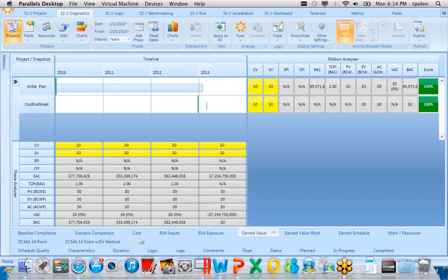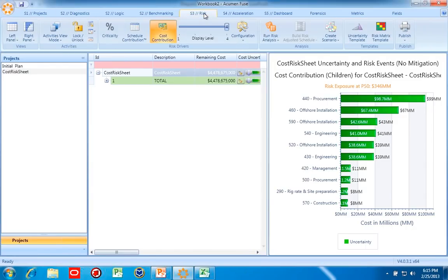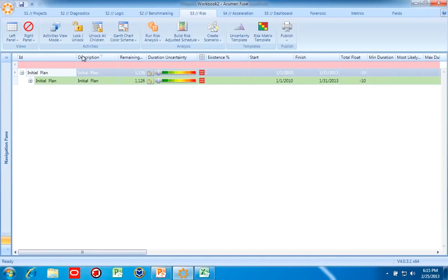Let me find a few more here. Do the P50 dates import seamlessly back into P6? Yes, and this is a capability that I'll mention as well. This is a question from Vincent. As I'm creating those different scenarios and adding P80 values in Acumen Risk, it's actually creating P50 and P80 values and dates in fields that it's creating.